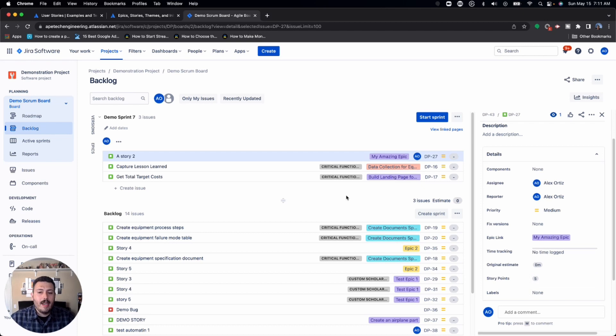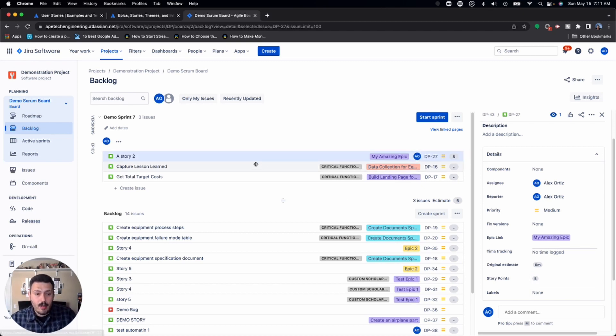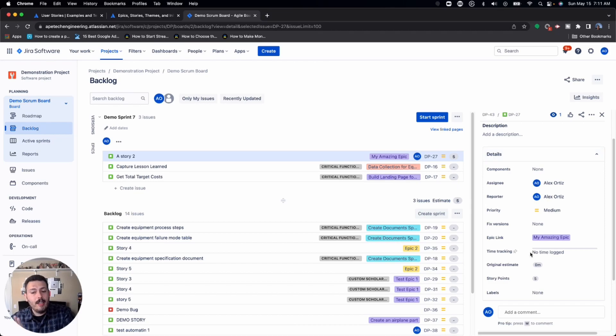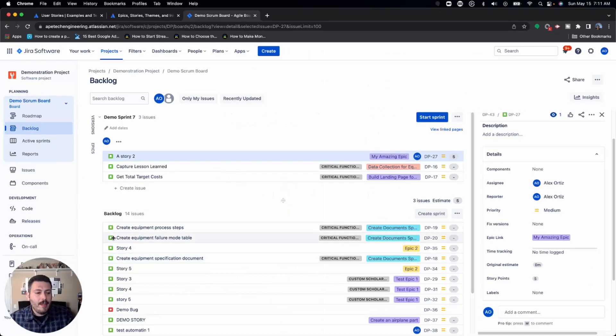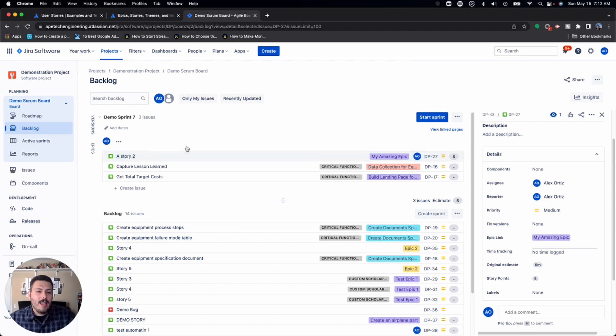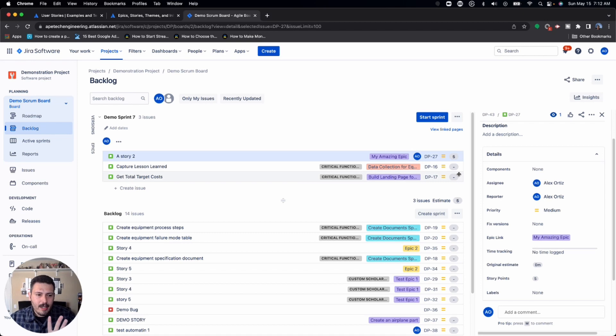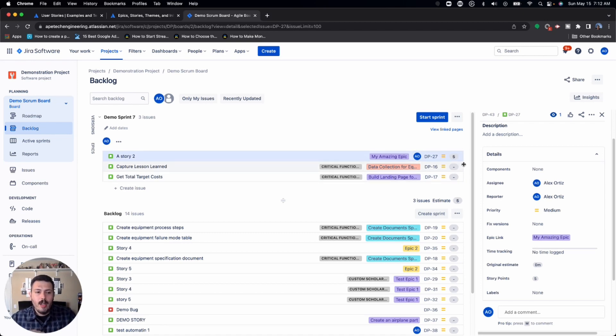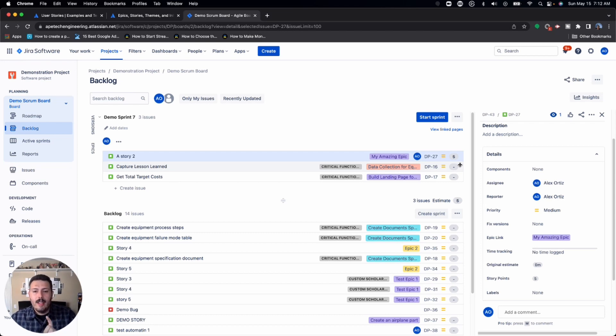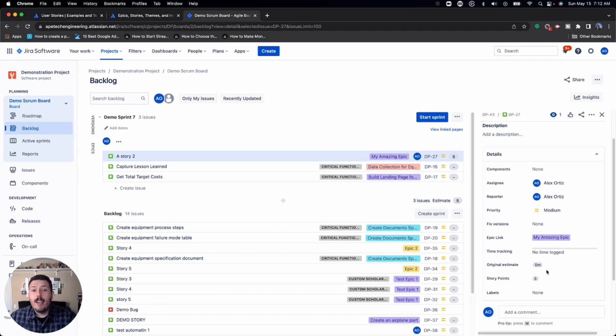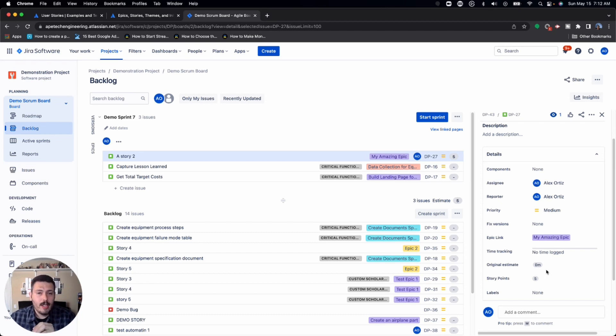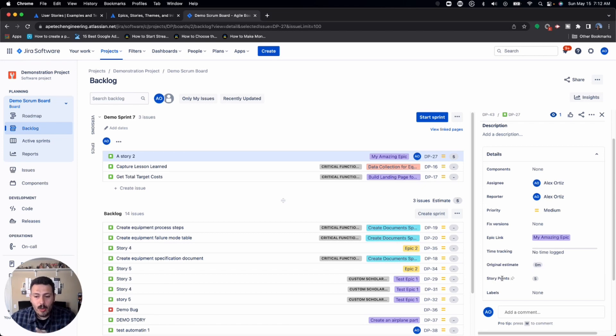Now, because you're in a company managed project, you do have to basically click on the issue, come over to the right, find the story point field, and then add the value. If you're in a team managed project, this process is a little bit more fluid. I firmly believe that the company managed project is still a bit better because you do get the full features. If your story point field isn't available to you, you're going to want to go check out my video where I show you how to enable the story point field in your Jira issue.